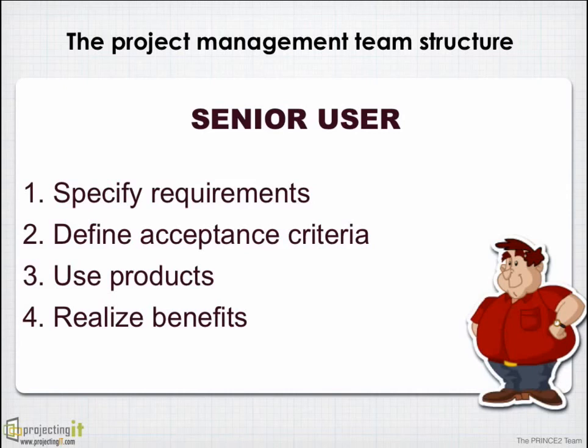For example, if the CRM system affects more than one department, maybe if those departments are also affected stakeholders, I can bring their representative, a senior user, on my project. They get appointed in the beginning and they are part of the project board. They ensure that the user interests are protected. In fact, those who are going to support and maintain my products in the operational life are also users. So somebody from the internal IT team who has the responsibility for supporting the production environment can also be brought in as a senior user.